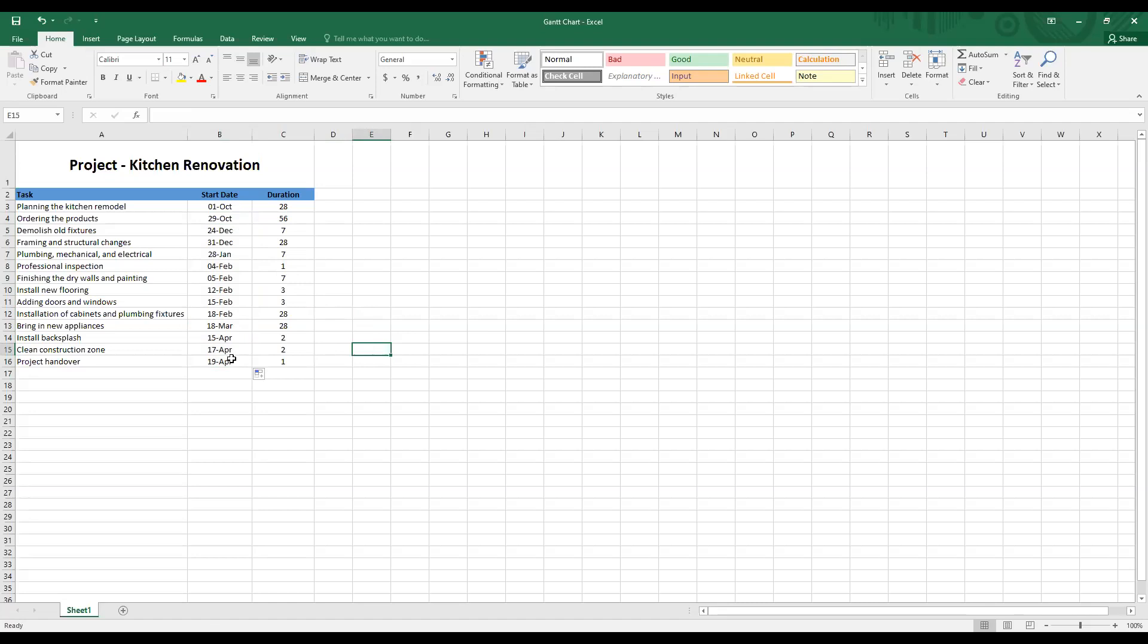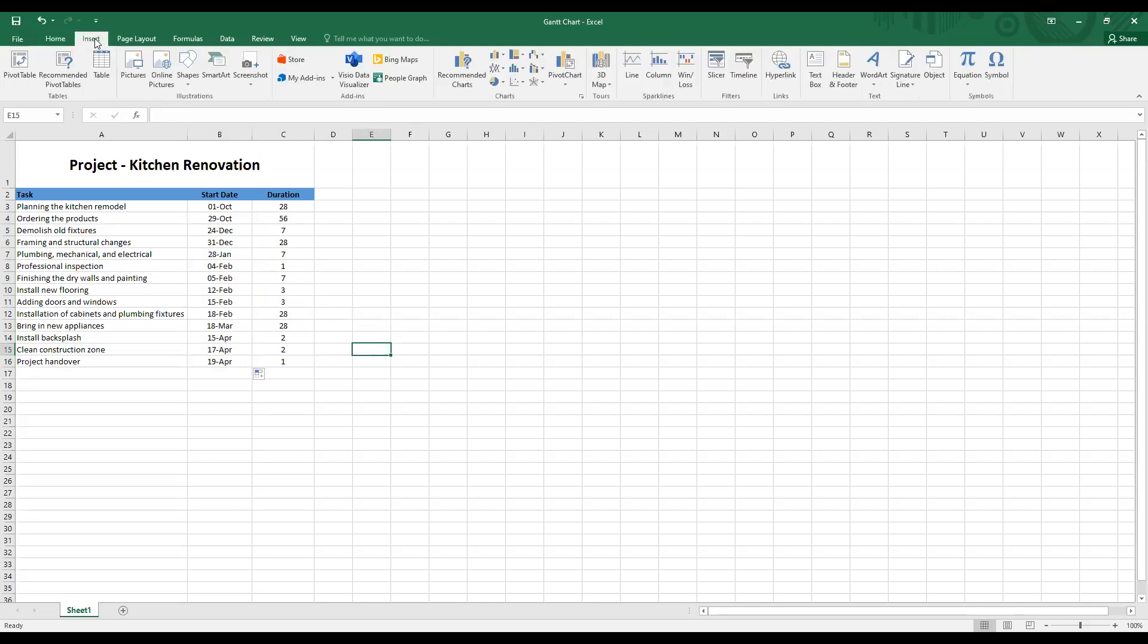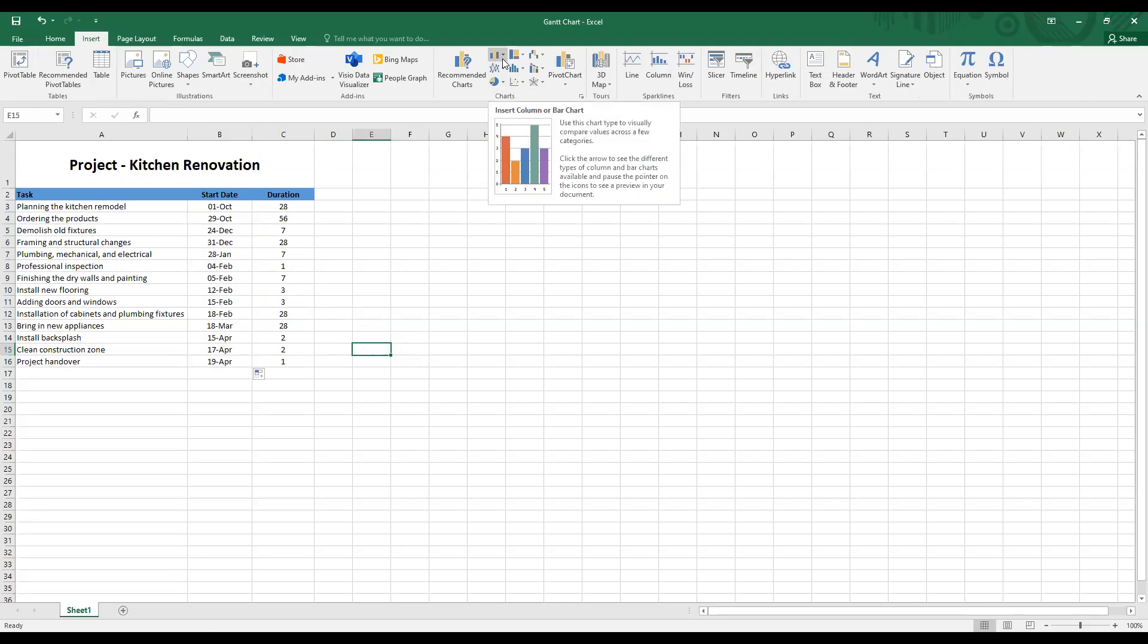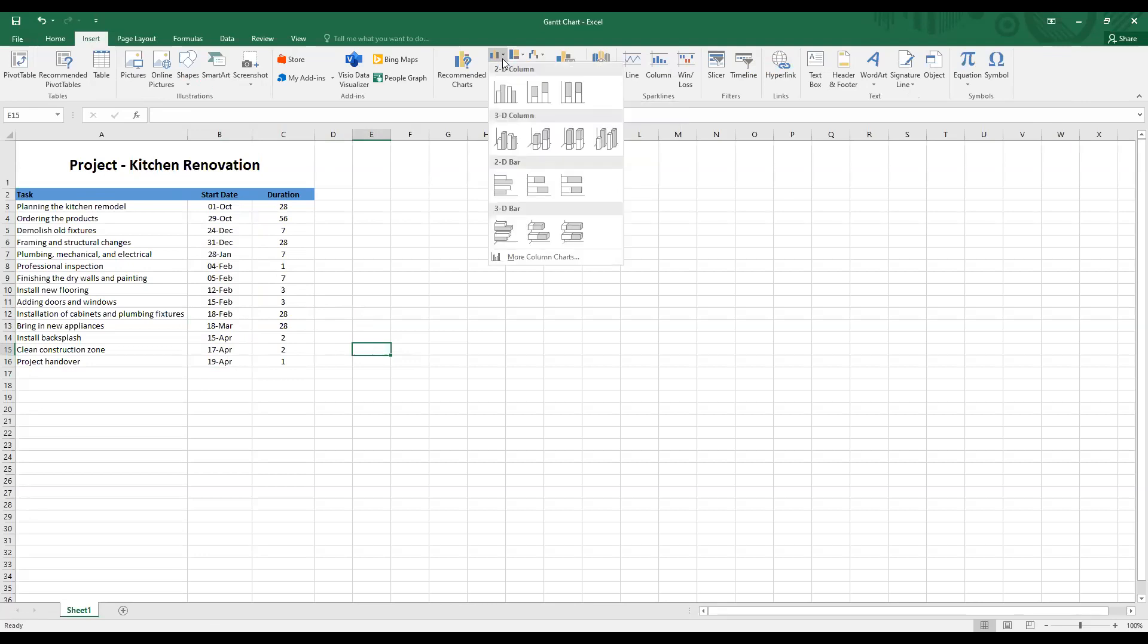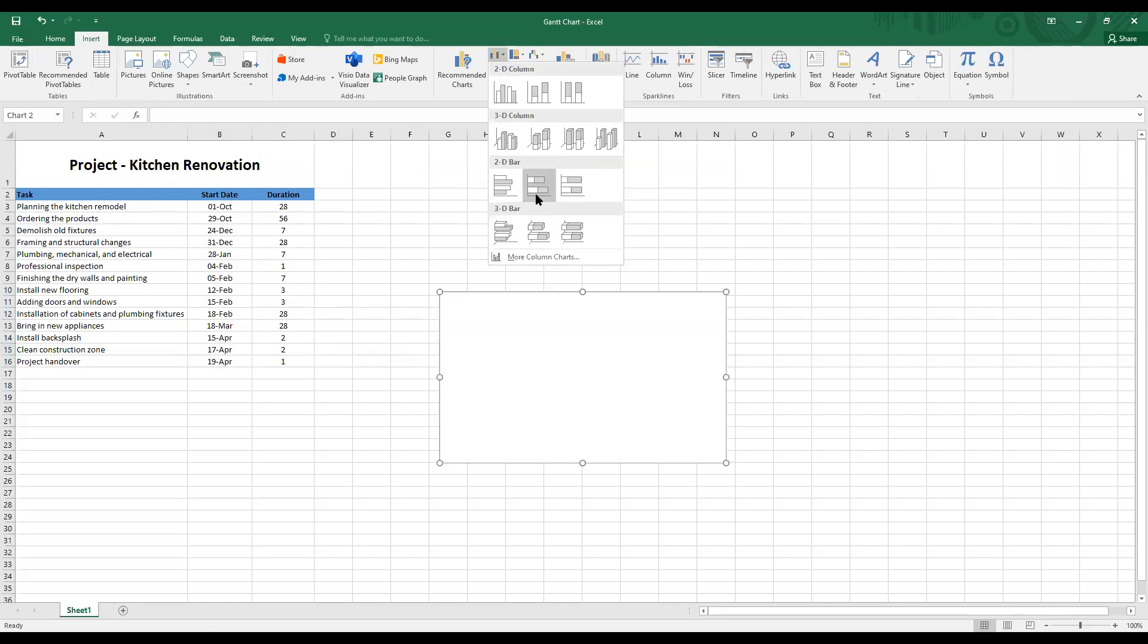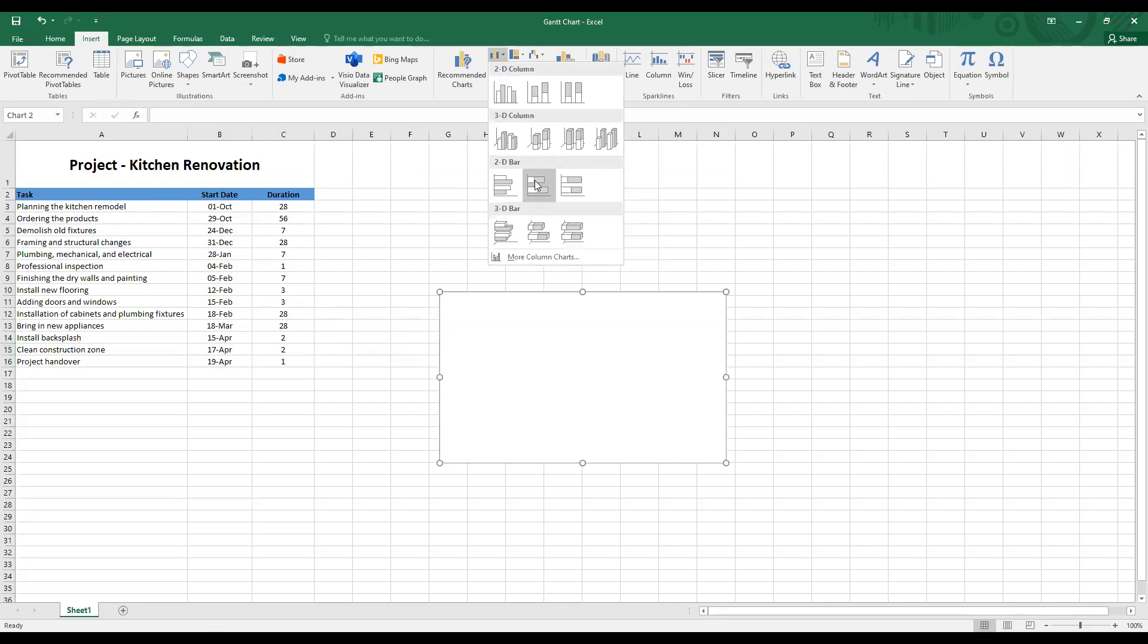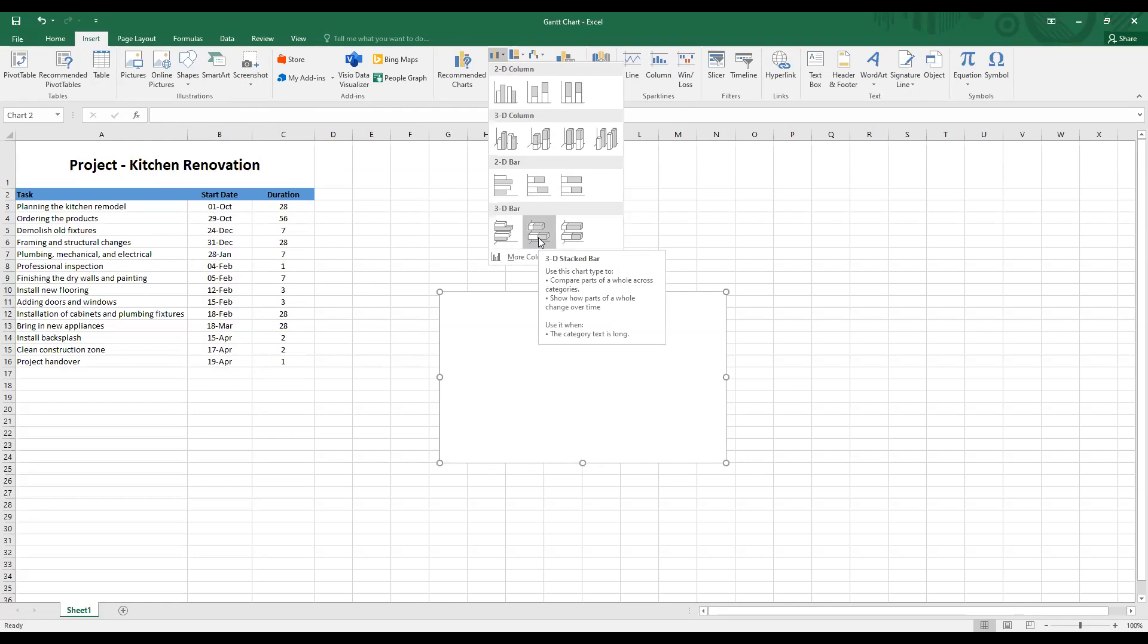The next step is to create the Gantt chart. For this, click on insert from the ribbon panel here. And then expand the insert column or bar chart. We will select the 2D bar or the 3D bar. The 2D and the 3D stacked bar have the closest format of a Gantt chart. I will go ahead with the 3D stacked bar because I want to give more visual data to my Gantt chart.